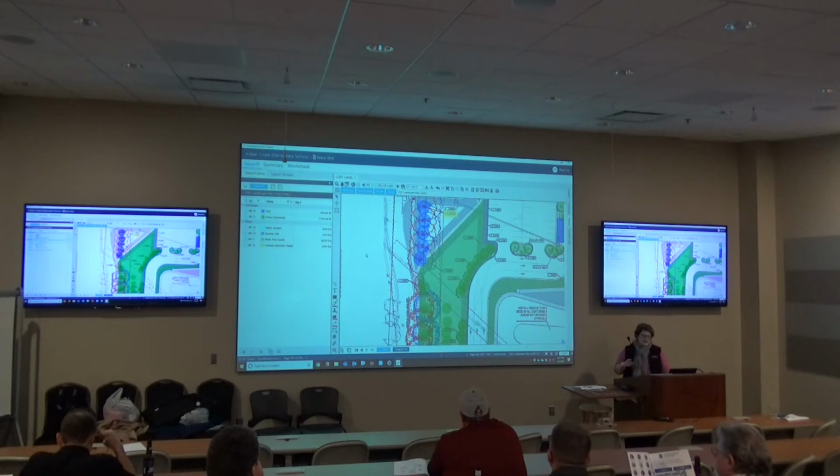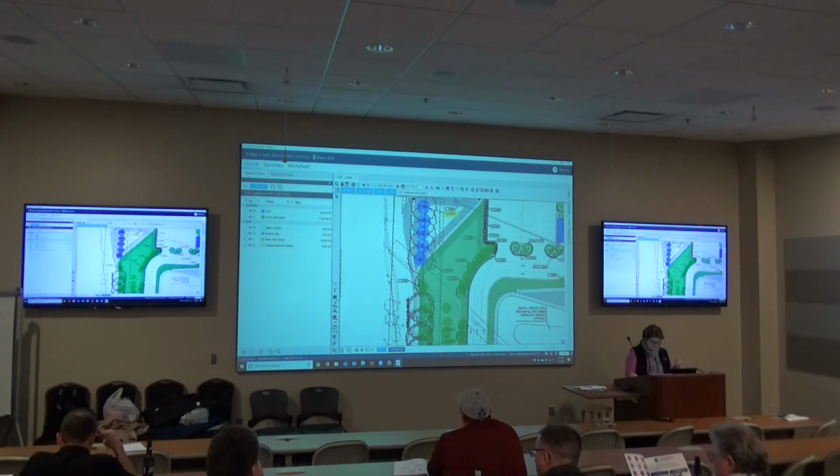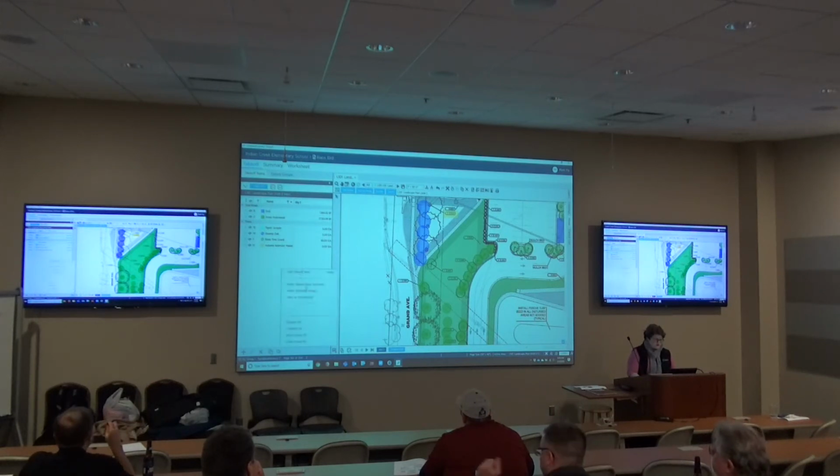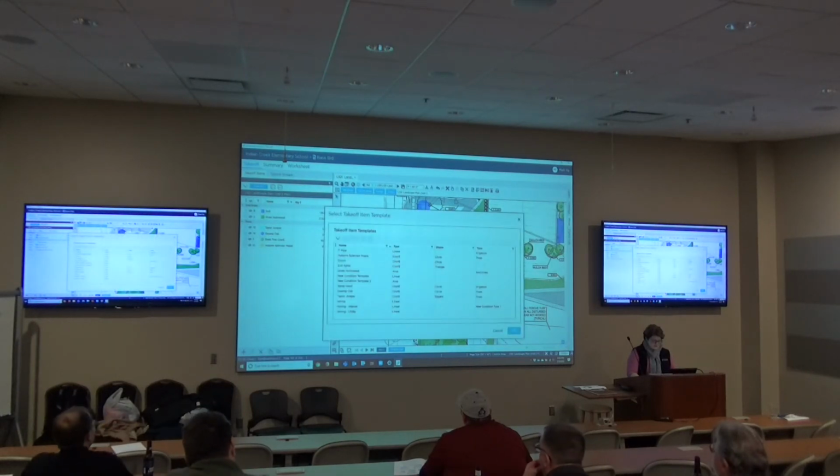Right. Now, one of the things that we pulled from the on-screen side, and let me shut off overlay there a little bit, is multi-condition takeoff. Those of you who use it on-screen, have you ever used multi-condition takeoff before? No? What it means is simply this. If you're going over the same perimeter, the same area, the same direction, with multiple items you need to quantify, you can grab them both and knock them both out at the same time. That's all it means.